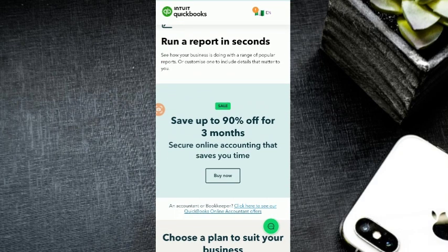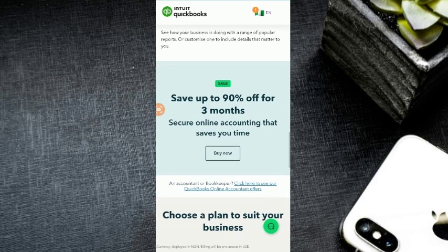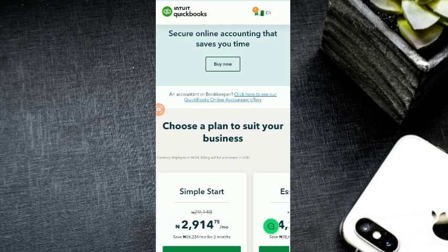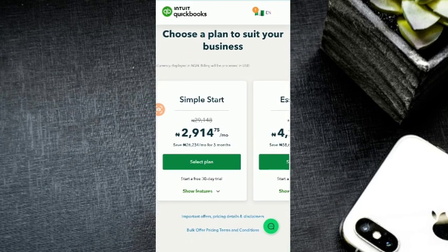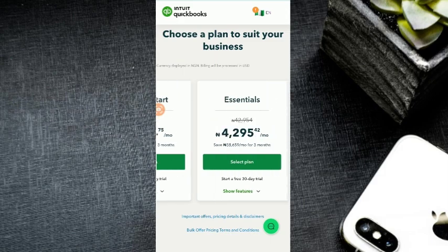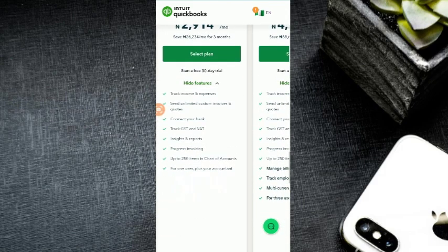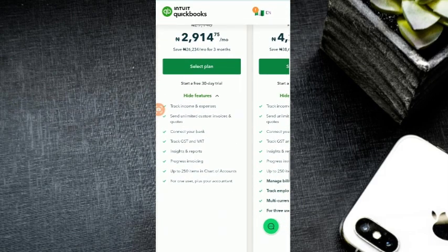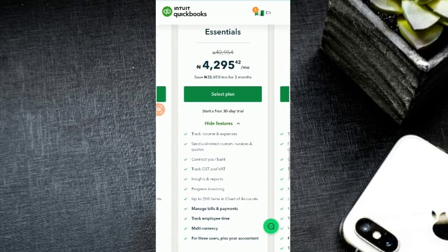And the final step is to customize and save. You can apply filters for customers, service items, or date ranges, and then save the report for future tracking. A pro tip is to run these reports regularly to spot cost overruns early and adjust project budgets in time.